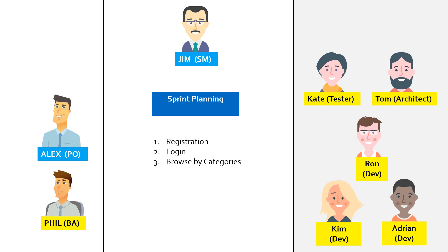Story points in Agile are in Fibonacci series: 0, 1, 1, 2, 3, 5, 8, 13, and so on. For a story, maximum story points would be 13. If it is more than 13, then the story should be broken down into two stories.